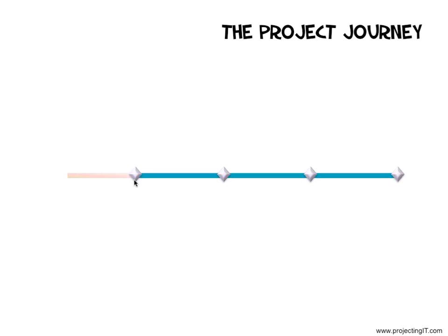Before the first management stage can begin, we do a feasibility study of the project. You can call it startup or you can call it pre-project. This is where we identify the project objectives and investigate the reasons for doing the project.